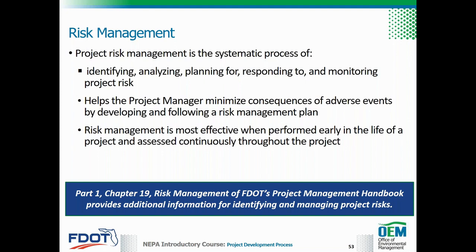Since risk management and analysis is an ongoing process throughout the life of the project, managers must continuously monitor, control, and identify and analyze new risks for the projects. This can be achieved by adding project risk to the agenda for project meetings. For additional information, see FDOT's Project Management Handbook, Part 1, Chapter 19, Risk Management.